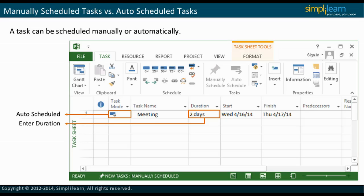If the project manager directly edits the duration, start date, or finish date of an automatically scheduled task, the task will switch to a manual schedule mode. In the next slide, we will learn about the project outline.